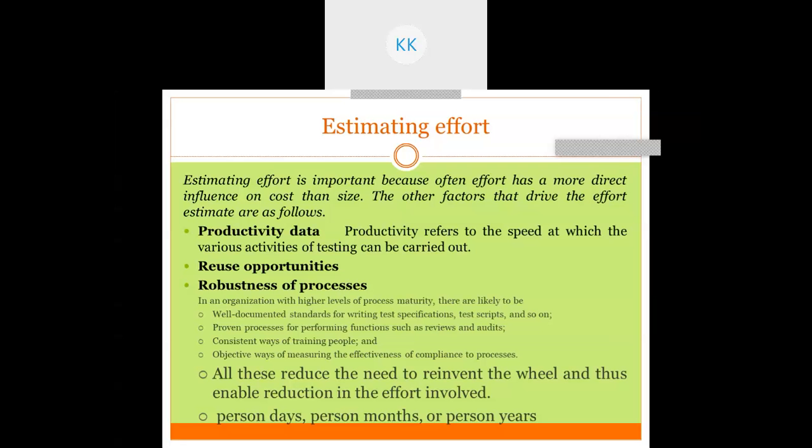So the effort required is relative to the size, but again, there may be interdependency among the test cases, and that will affect your productivity. Right? And then some reuse opportunities may be there, so it will reduce your effort. If you are using a certain tool which is already tested, then the effort for testing that particular tool will get reduced.